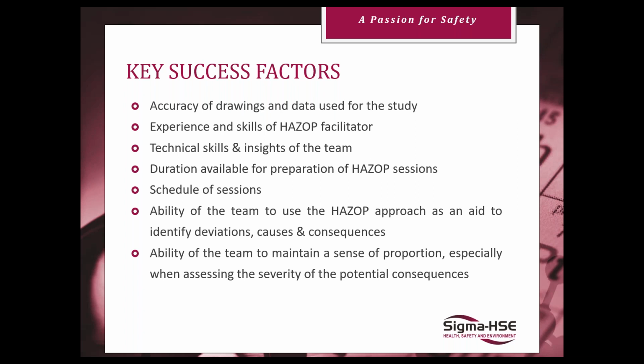Schedule of the sessions. Some people only do half days, so you'll do 5 4-hour sessions, which is fine, or you can do 6-hour sessions. I've seen people try and do 16-hour sessions, and you don't get effective results if you're forcing someone to sit and walk through this process for extended hours each day. It's important that you think about team involvement as well as your deadlines.